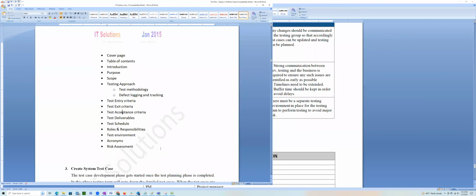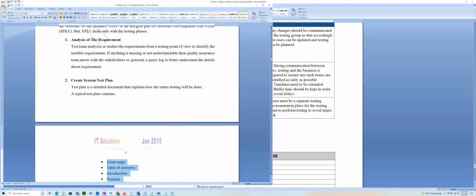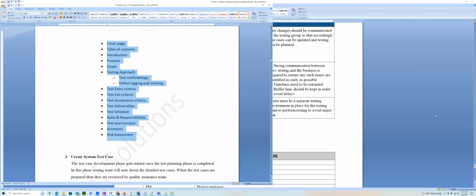So there is a criteria defined before you go into your testing, and that is given there. Usually, it's okay to have minor bugs in an application. It's okay to have a few medium bugs, things like this. So these are defined prior to going to testing. Okay, so that's pretty much your test plan, guys. Any questions? This is phase 2 of STLC, your test plan.